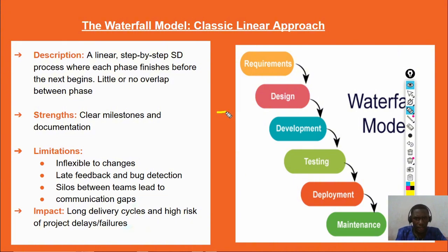And one of the issues that leads to long delivery cycles is this. If, for example, we take our restaurant application that a user wants to make for his restaurant, and he wants the developers to develop 5 features in total for him, he meets them here, and these are the developers. They will go forward and start. Now in this particular model, everything has to be done at once, right? If they have to develop 5 features, they have to finish all those 5 features that constitute that application before they can ship it. So they bundle everything as one, work on everything at the same time, compile everything, and deliver it to the users.